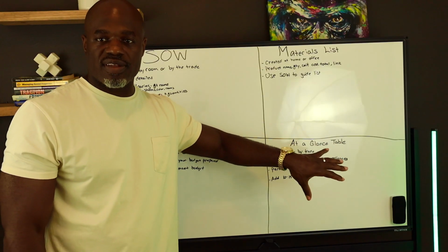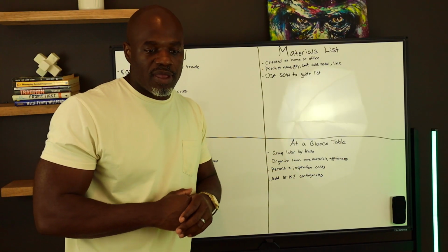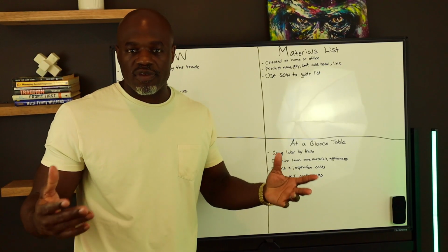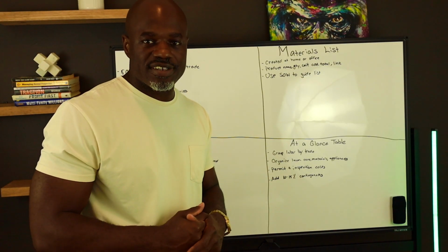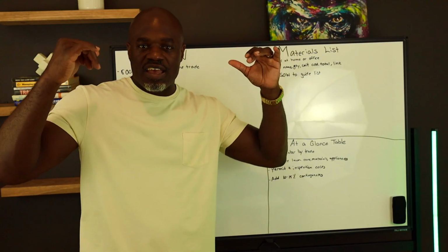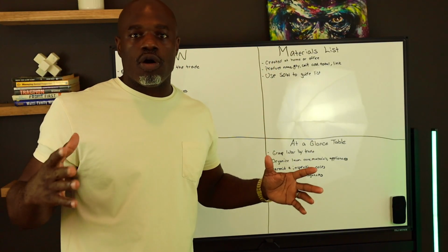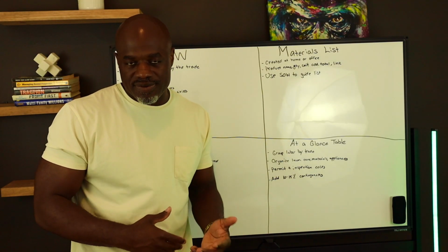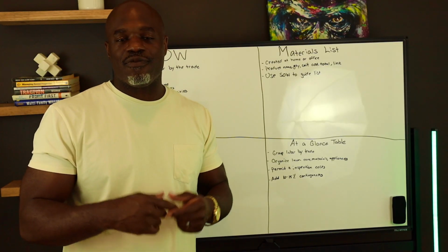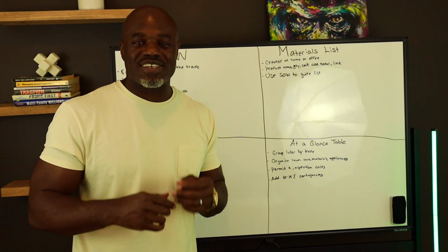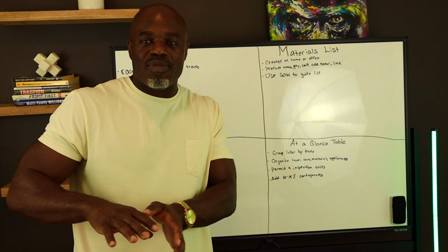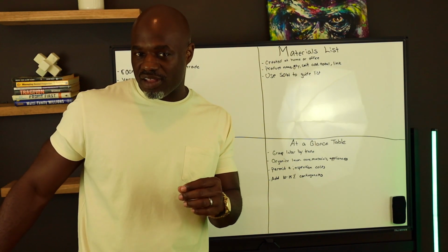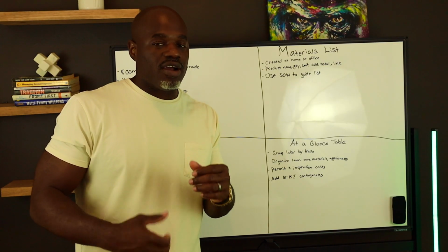So if we're doing a renovation, if it's maybe a newer building, you can go with 10%. Now, if you guys are doing full renovations, going down to the studs, you're renovating your inner city 100-year-old homes, those old homes where everything is wrong with it, then maybe you may want to go 15, 20% for your contingency for when things happen. It's not just if, but it's when things happen. You want to have money set aside to where your project can keep rolling because you have a little savings account that you can tap in for that unforeseen.